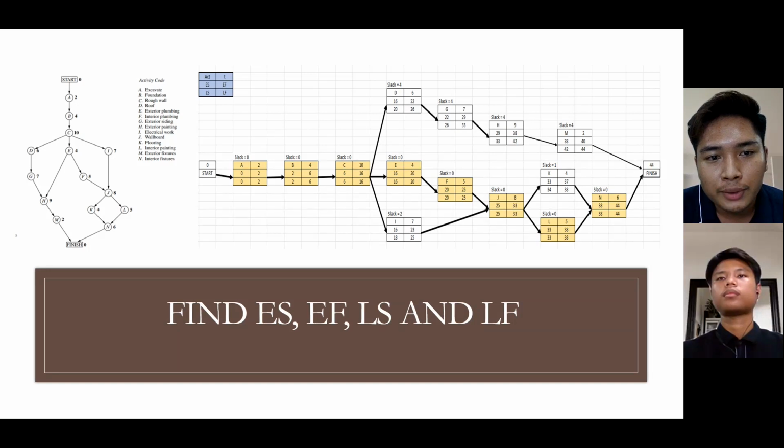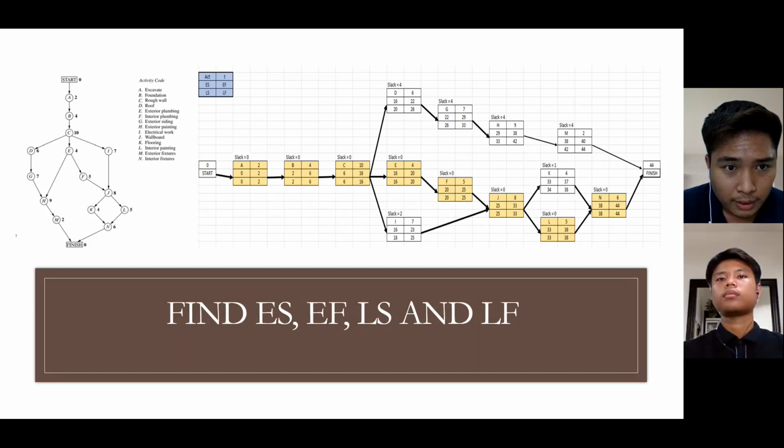How do we determine the slack time? We can choose between two formulas: late start minus early start, or late finish minus early finish.